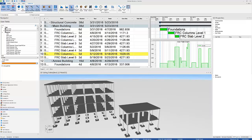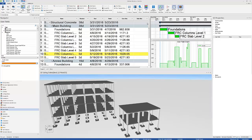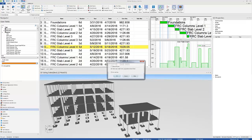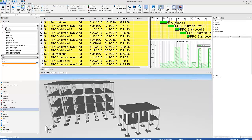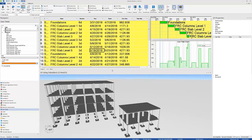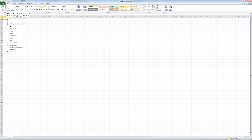Now, it's preferable to go to list mode in that case, so that we don't see the parent activities. But you can still do that in WBS mode. When I go to list mode, I can hit Ctrl-A to select all of my tasks. Then right-click, copy tasks as text, and then load up Excel and paste there.